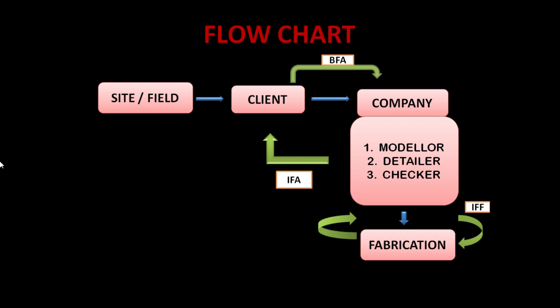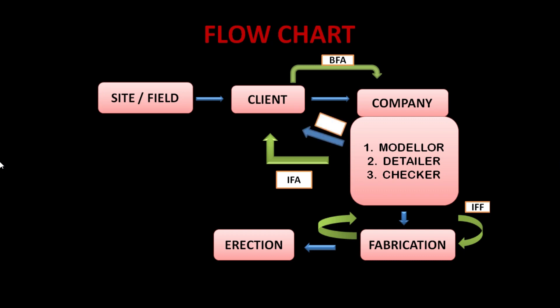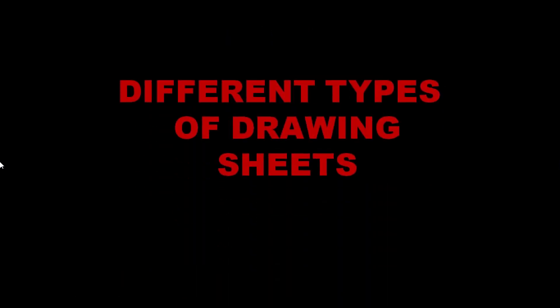The fabricator's work is to mold the members as per the drawings given by the detailer. After preparing the members in the fabrication shop, the fabricator sends the members to the site for erection — which is essentially construction. After erection, there is commissioning, which is inspection. During modeling or drawing creation, if you have any doubts about client standards, you can approach the client through RFI — Request For Information.